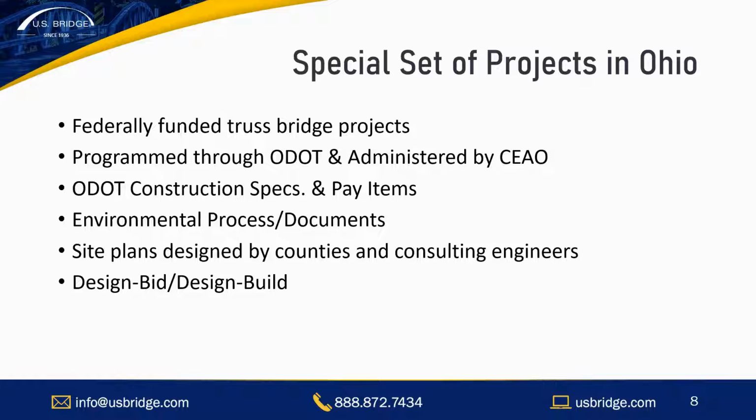These projects have followed ODOT's construction specifications and their pay item catalog, and they have followed an environmental documentation process. Their plans have been developed by the counties themselves or by consulting engineers, and the site plans that I'm describing are really the bid set that hits the street for bid.